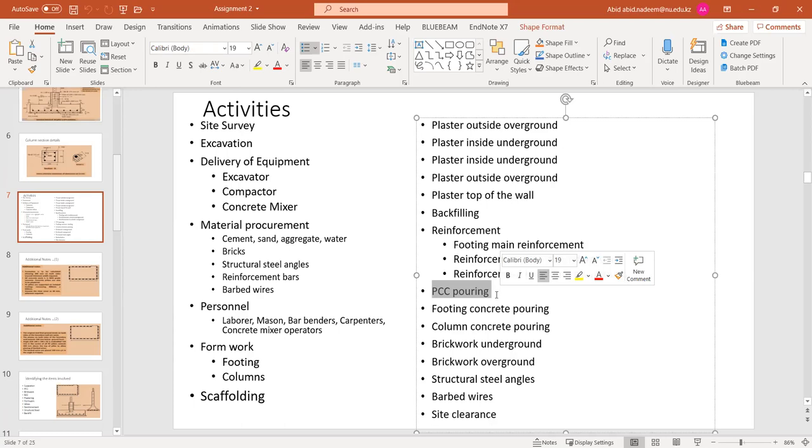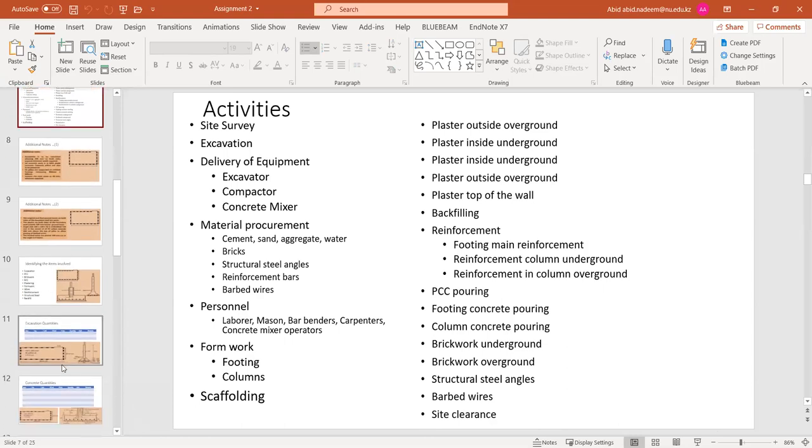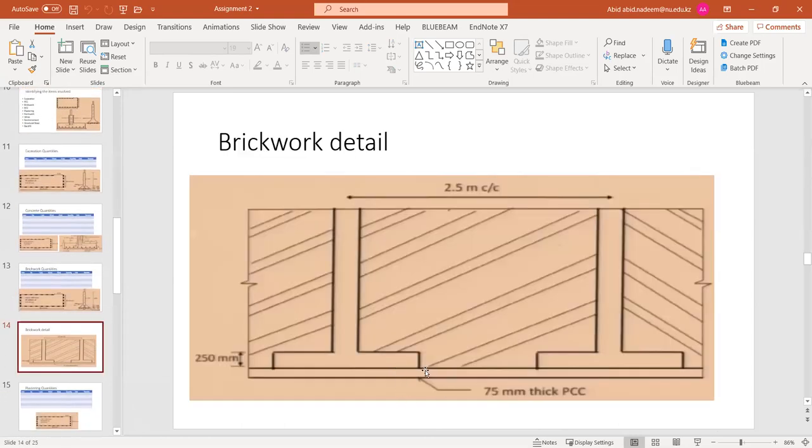And then, okay, as you have said about the constraints, there are actually, logically speaking, different types of constraints. One are the resource constraints, which also include the physical constraints as well. So we can have three types of constraints: resource constraints, physical constraints, and logical constraints. So there is no logical constraint between the concrete pouring and the brickwork, because the areas are different, okay? Since the demarcation has already been done, we know the positions. So the brickwork may start in this area, logically speaking, okay?